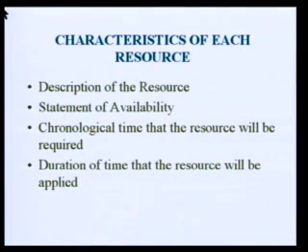The third one is the chronological time that the resource will be required. Exactly when there is a requirement of this particular resource. This is what you have to decide at this stage. Chronological time that the resource will be required. So you should also estimate when you need that particular person with those skills.